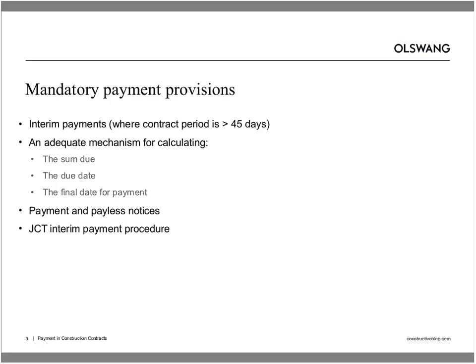We're used, I suppose, to seeing monthly payment terms, but that's not a specific requirement of the Construction Act. And it may well be the case that some contracts that we see have longer payment periods, 2 monthly, 3 monthly, or whatever, and sometimes milestone dates, so that payment is linked back to progress of the works.